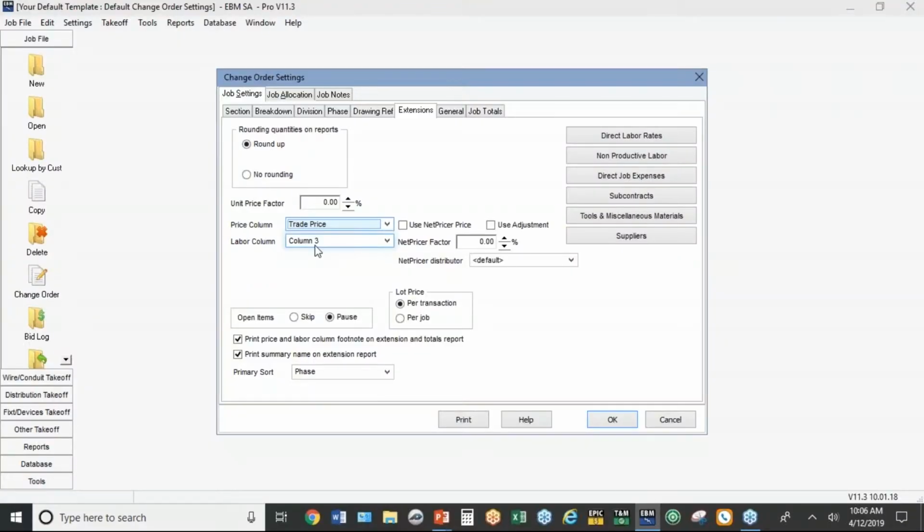Finally, the other option that we can take into account is the markup for overhead and/or profit. Sometimes that's the most restrictive because you may have a contract that says you can only put a 10% markup, period, on the job. But with these other variables, the price of the material, the labor hours we're using, and the hourly rate, we've got a lot of options to play with. And I'll show you one more when we get to the final job extension. There's a way to put a material factor and not even show how much you're marking up the material.